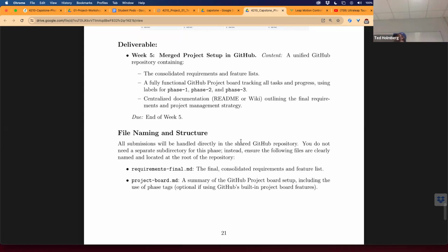And then each pod can check out one of those tasks. And each of those tasks has to be ascribed a weight so that we know, is this a task that's expected to be like an hour's worth of work versus like 40 hours' worth of work? Does that kind of answer your question?